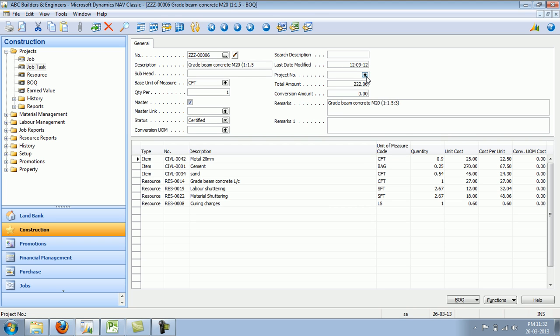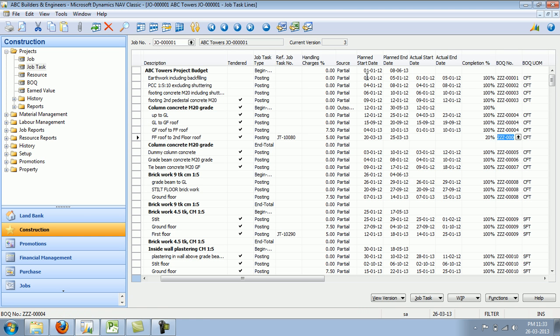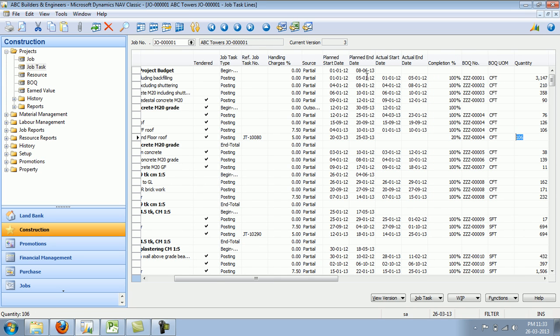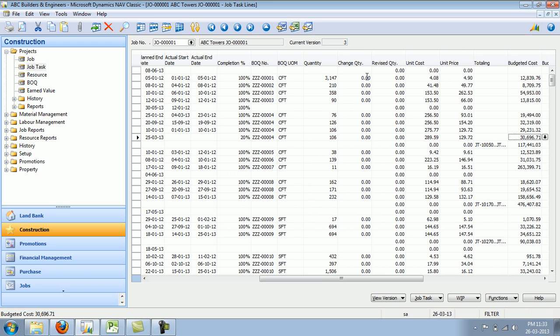This again could be useful when a company executes various projects in a particular location, and when they start to execute a new project in a new geography, maybe their cost will vary. What they can do is copy the master rate analysis info and make it specific to that particular project. So since we have now estimated the individual item and resource composition, the moment we specify the overall quantity, system will multiply it and arrive at the budgeted cost.